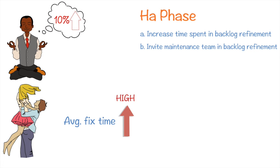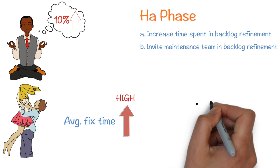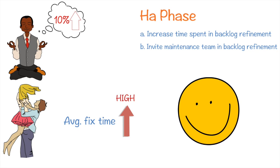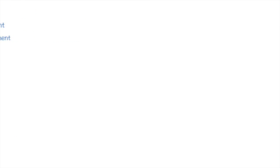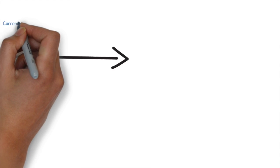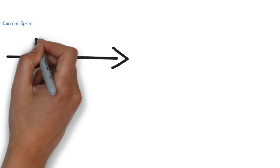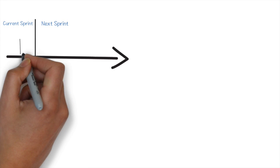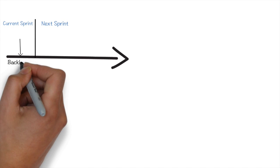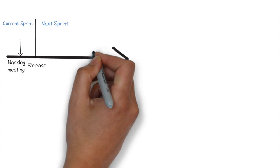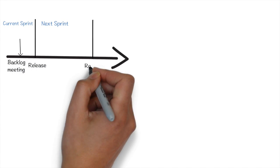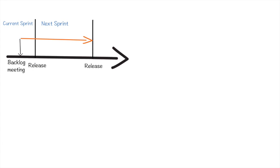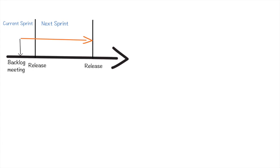As Trade Bull kept progressing in the sprints, the maintenance team was elated because their average fix time had reduced and customers were very happy. Currently, the lead time by when the logs were implemented and the software released to customer was one sprint plus one week. That is, maintenance team gave requirements in the current sprint's backlog refinement meeting which was taken in the next sprint for implementation and release.